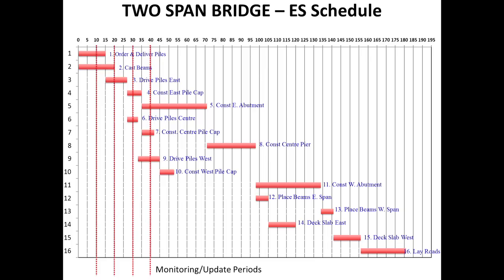I could choose to do it every 5 days, 10 days, 15 days. Let us go to some extremes. Obviously, it does not make sense for me to review it every 3 months, because within 2 updates the project will be over. If I only know the status of my project after 3 months — that some things are happening, some things are not — that is really not enough time for me to do any control action.